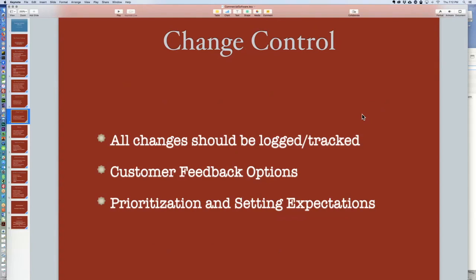With all of this, you need to have a way to do prioritization and set expectations. This goes back to having a release schedule and well-defined releases. But within this is also figuring out, because we're probably not going to be able to do everything, maybe a ranking of 1 through 5, where all the 1s need to be done and the 2s need to be done, the 3s maybe, the 4s and 5s probably won't be done. Some way so that your development team, your implementation group, understands what really needs to be focused on for any given release or update.